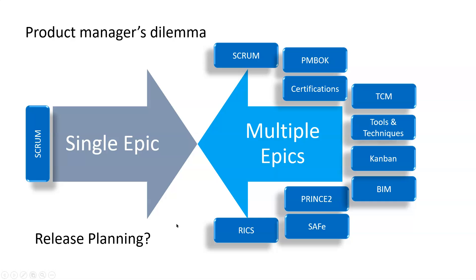One of the product manager's dilemmas is how to release these videos. Even if we decide to release videos based on all these epics, how do we plan those releases? One option is to focus on a single epic — say, focus only on Scrum — and release all related videos in one stream, maybe over three months. The advantage: people with specific interest in Scrum will subscribe, and we can release a complete playlist of maybe 10–20 videos quickly.